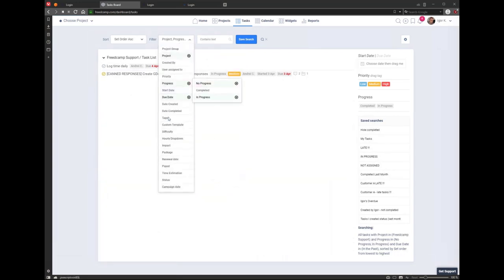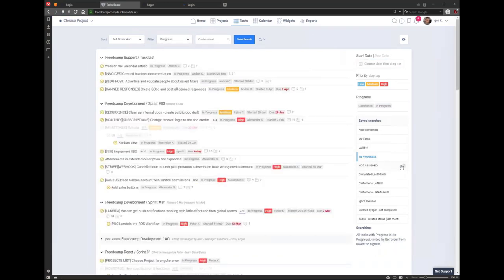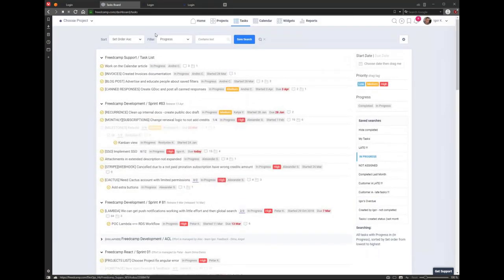If you select progress filter, you can see all tasks currently in progress across all projects. If something is overdue, that means it's not right — you need to ping that person to ask them to change the due date. If they're still working on it, they have to adjust it to make the date realistic.